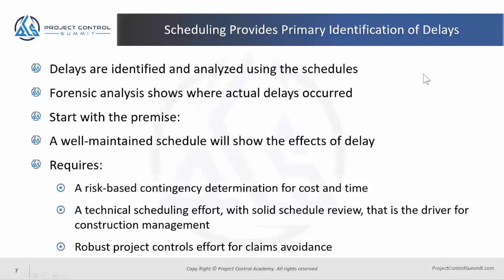Scheduling is really where the primary identification of delays comes from. It's the main communication tool in the project, but it's also the basis for delay analysis. If the schedules are terrible, then delay analysis is going to be terrible. So we use the schedules to identify delay and to do the analysis. When the actual delays have happened, we use forensic analysis to go back in and examine it and find out what happened.